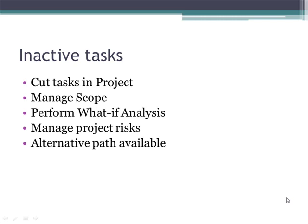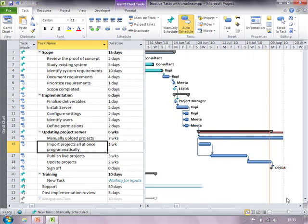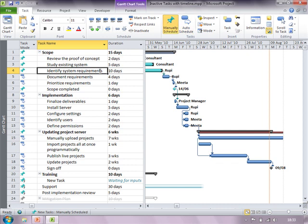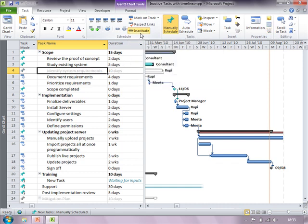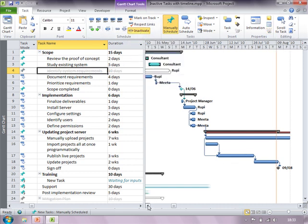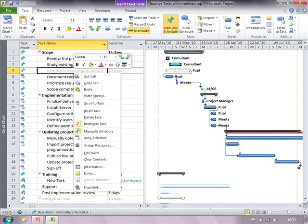Let us consider a small demo to understand inactive tasks in detail. I have a project schedule here in which to inactivate a task I can simply click on the task and from the ribbon bar choose inactivate. Additionally I could just right-click on the task and check or uncheck the inactive task option.